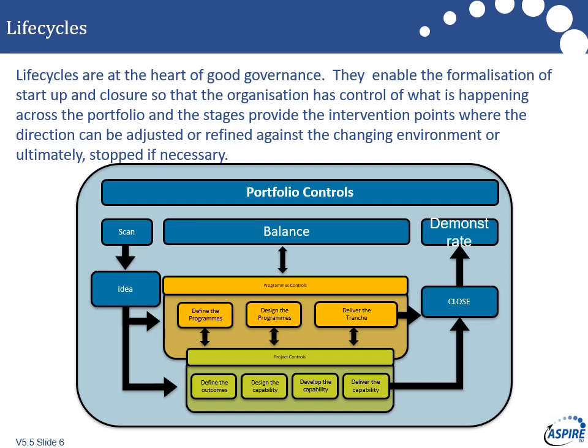And if you have a look at the P3M framework, you can follow quite a detailed description of each one of those. But each one of those stages enabled us to maintain control of every program and every project within that program by having stages, and within those stages, preset milestones. If they weren't hitting the milestone, then there was something wrong. Okay, so that's how it worked.